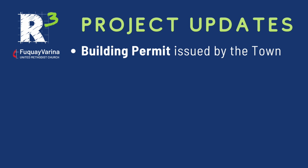Let me drill down into some of the details now. Right now, we're doing a lot of prep work behind the scenes. So the town of Fuquay has just issued our building permit from the plans from our architect, so we're going to go pick those up in a week or two. Super excited about that. Our general contractor in the next 2 weeks is going to start getting bids for all the subcontractors that they'll need to do the work.